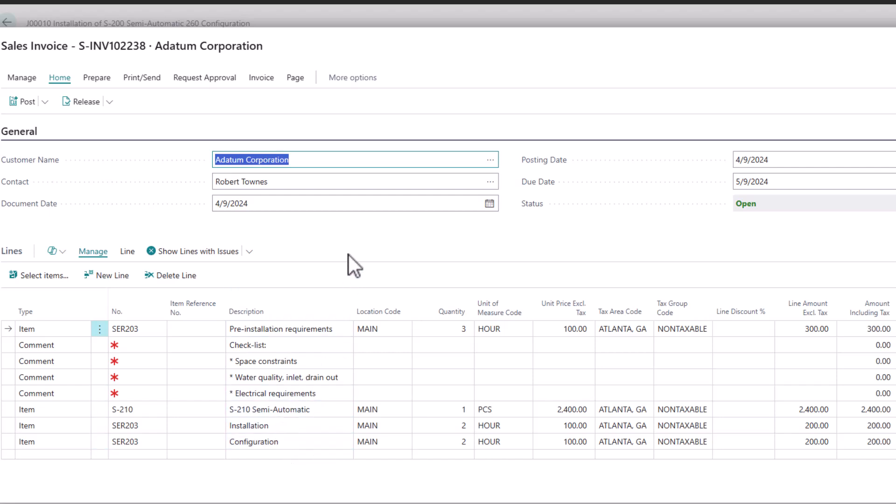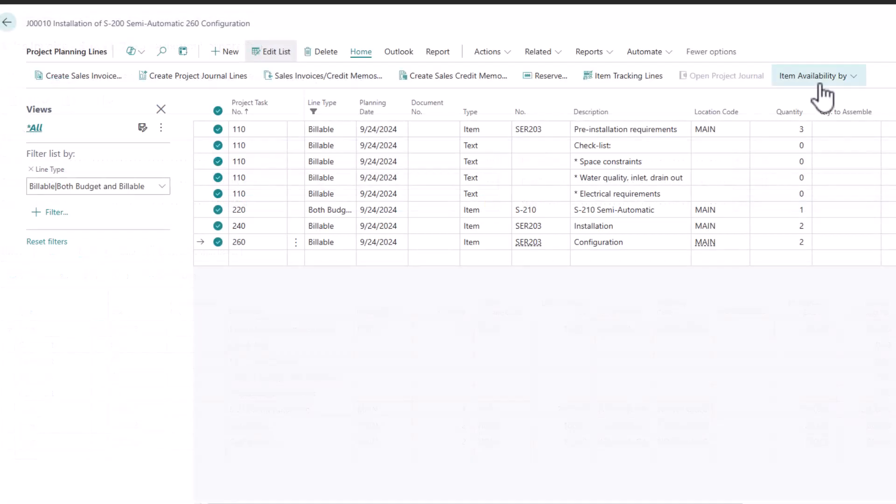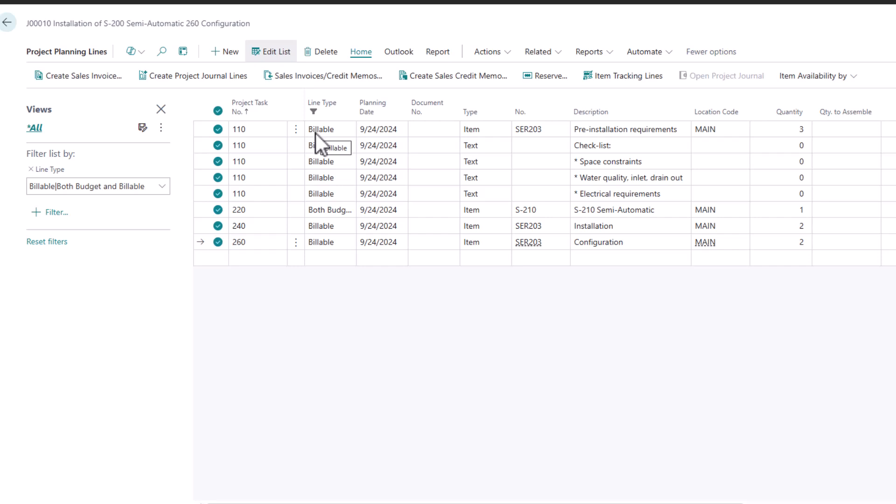Now if these were planned on different days or different planning dates, then what you would want to do is you would want to apply a filter for let's say the next seven days. And I can actually do this for all projects all at the same time, where I say show me all the project planning lines within a certain date that have a billable or both budget and billable type and create the sales invoices.